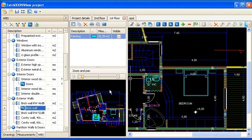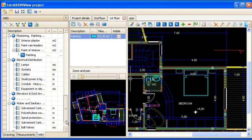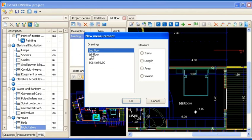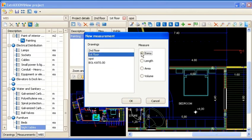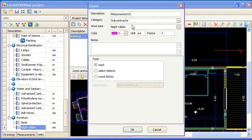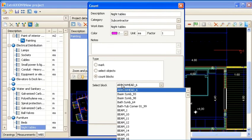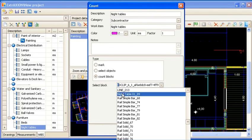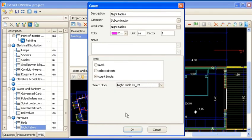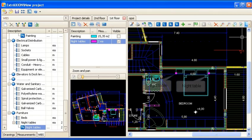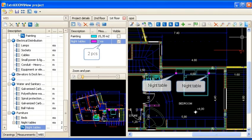In addition, you can use existing blocks for automatically counting items, for example night tables. Start a new measurement from the WBS tab, select the appropriate drawing and choose items in the measure box. In the count window, after specifying the description and details, you can select count blocks from the type box. Then, you can choose which blocks you would like to count using the select block list. All existing blocks of the specified kind are marked on the drawing and their sum appears in the drawing measurement sheet.